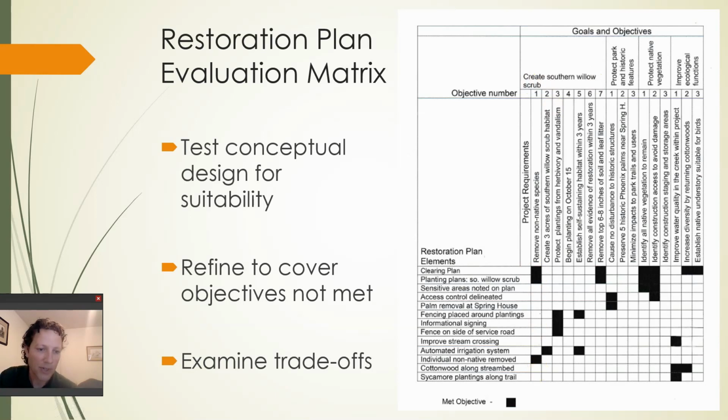And maybe it's not a consultant, maybe it's one of your team, but that's okay. Either way, you need to double check it, because again, that's your responsibility. You're responsible as a project manager for the quality of the project deliverables. So you go through this and you look at all those intersections, and then afterwards you look for gaps. So here and here, and these 2 columns here, and one more, those are not met.